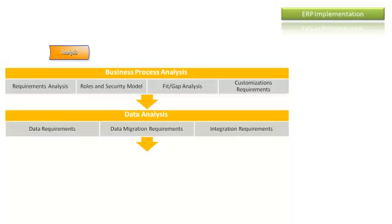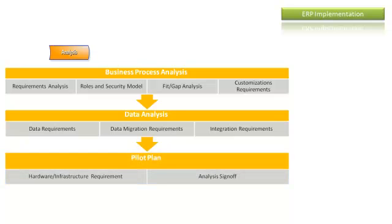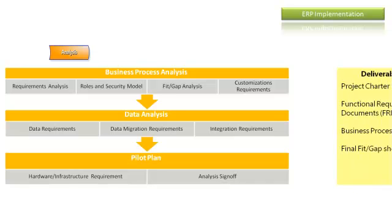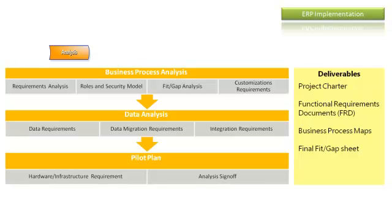We then move to data analysis. The consultant analyzes the customer's data requirements, mainly representing reporting requirements and data migration needs — identifying what master data will be migrated from the legacy system, the mapping requirements, the migration approach for opening balances, and required data cleansing. Integration requirements consist of two parts: internal integration between modules and sub-modules, and external integration with other applications, identifying integration points and flow. Then hardware and infrastructure requirements are prepared based on business process operations, expected number of users, organizational structures, and locations.